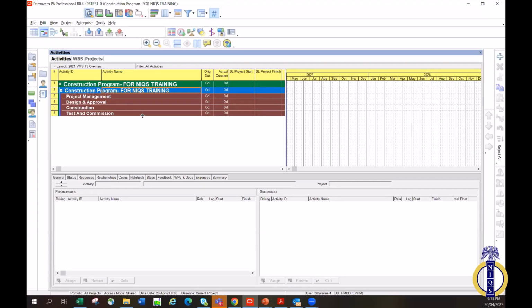That's one of the characteristics, and it is depicted by zero duration. On the question, you see duration is 0 for that milestone activity. It said contract award, put as start milestone, and duration is what? 0. Then assign it to WBS test 1.